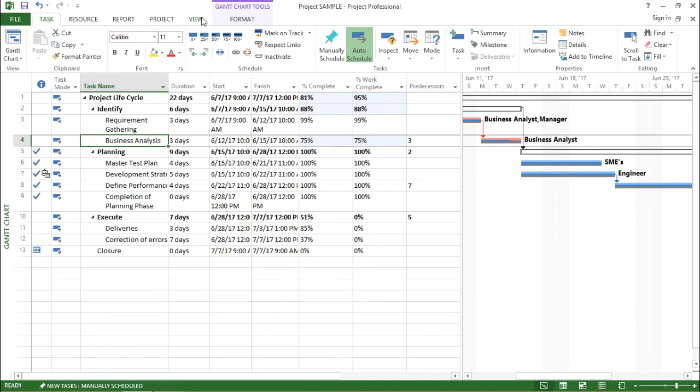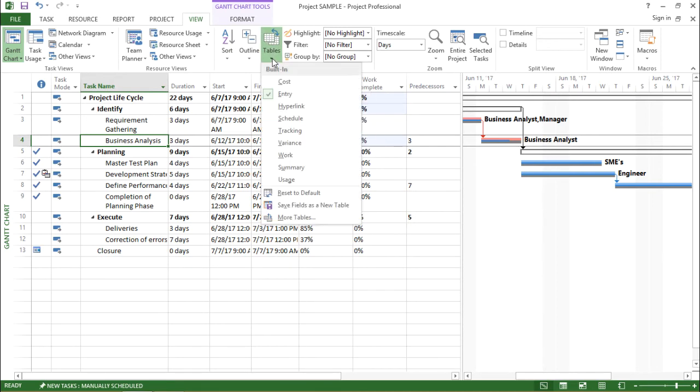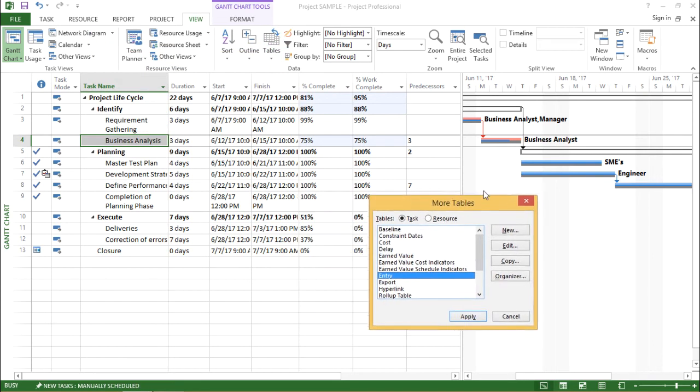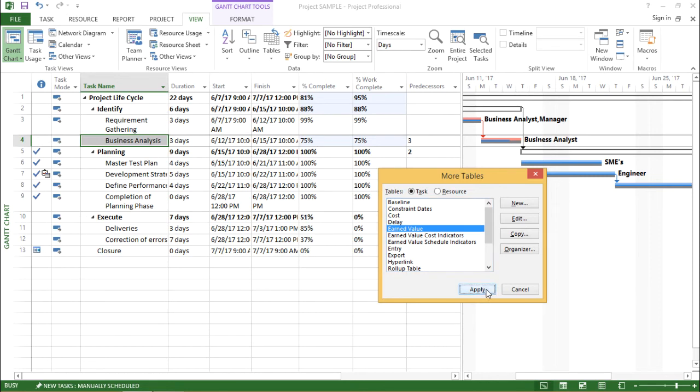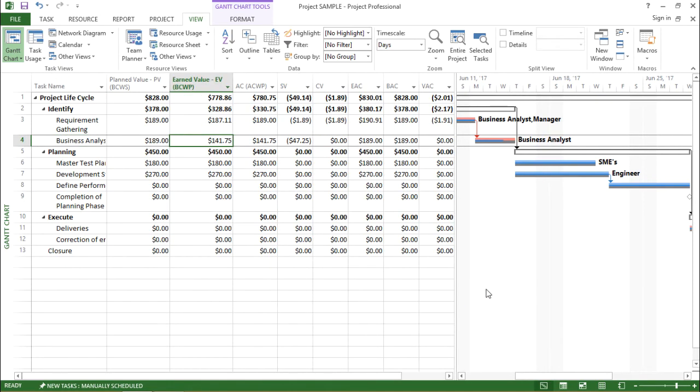I have to go to the view tab and under the view tab, I will click on table drop down box. And in this drop down, I'll click on more tables. Another window will pop up in right in front of your screen. And in this menu, I will click on earned value. Let me apply this changes. I'll click on apply.